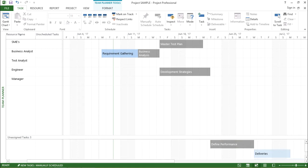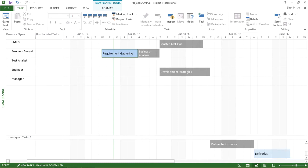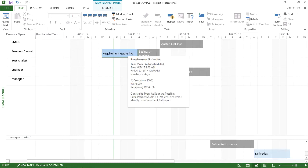Let's try to understand what these bars are and how they are being arranged. If I hover my mouse over requirement gathering, you can see all the details in the white box right below it. I have the task mode, whether it's auto scheduled or manually scheduled, the start date and finish date, duration, percentage work complete, and work in hours — for example 27 hours — and remaining hours as well.